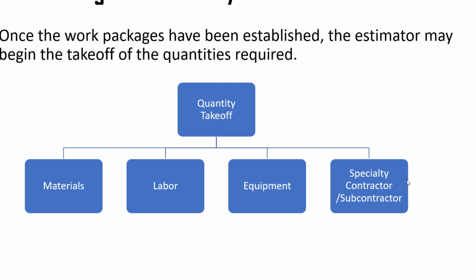So when we subcontract the work, the main contractor will also make a quantity takeoff so that he understands whether the subcontractor is bidding for too much or is missing any item. If any subcontractor has any questions, they can ask the main estimator, who clarifies what assumptions they can make. So even if the work is given to a subcontractor, the main estimator still makes an estimate of how much time, money, labor, or equipment is required for that particular job.